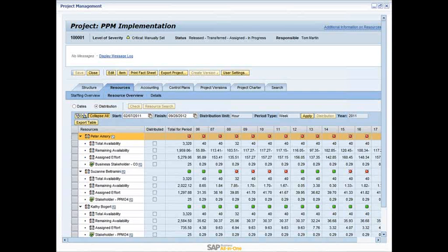And so the system, enterprise-wide, is looking at all the various projects that people are available for. And you can set availability for a person as being 40 hours a week, 32 hours a week, 8 hours a day. It's really up to you. A lot of companies want to factor in the downtime as line items in projects, the time they're not working in projects. Other companies want to say, well, we only have 32 hours available for projects in a given week because we spend 8 hours in various meetings and non-project functions. And that's entirely up to you.